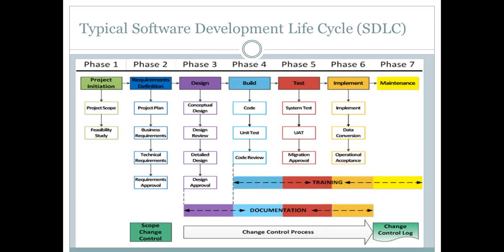Once the BRD is prepared, you submit it to the customer for review. The customer would look at the requirements, and then he would finally have to approve it, saying that all the requirements are captured in this document, and you have to deliver a system adhering to these specifications, right? That's a major milestone of the project: the BRD sign off, which is from phase 2, and your role as business analyst would be significant in that, right?